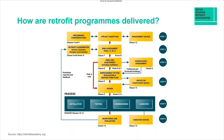Step six is monitoring and evaluation, to determine if intended outcomes have actually been achieved. This phase includes completing a questionnaire, and depending on the risk pathway, if any issues are identified this may trigger a much more intensive evaluation exercise to be carried out. At that stage this will need to be carried out by an independent retrofit coordinator.